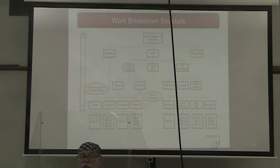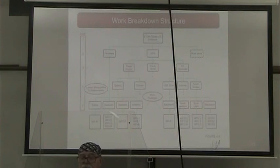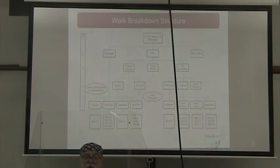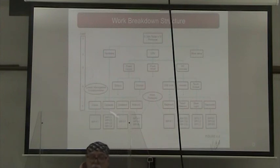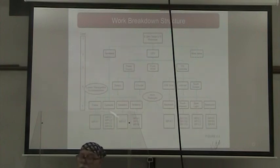We have three main divisions in the tablet WBS. Following the hardware branch down: it divides into frame, cameras, speakers, and antenna with work packages under each. People working on work package C1, for example, would be designing one of the cameras or a special camera feature. On the CPU side it'll be more about programming to use the different aspects being built on the hardware side. These are the lowest levels of manageable sub-deliverables.